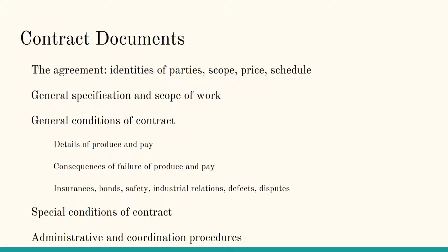Special conditions of contract. These cover additions and amendments to the general conditions as required by the purchaser and specific circumstances of the project. Administrative and coordination procedures. Frequently, the procedural aspects of a contract are covered separately as an appendix to the general conditions.